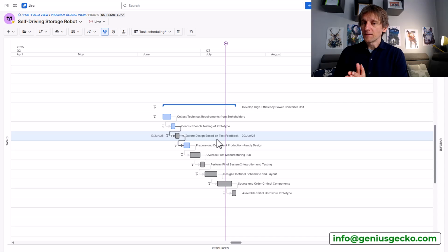But anyway, coming back to this, one other thing that is super important over here when it comes to the why is that the people that are working on these items will also benefit from you breaking down this hierarchy for them. You, or the team leader, or whoever is responsible for this. Because instead of working on one big chunk of work and not seeing any meaningful progress in terms of their project plan for the whole month, they get to grab a piece of work, complete it in a few days, and mark it as done.